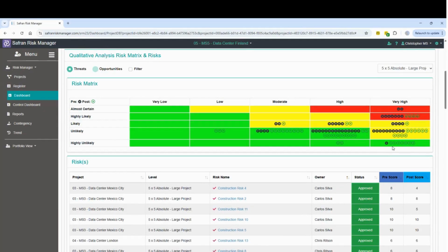These types of risks are the ones which invariably hide at the bottom of a probability impact diagram. And this is where my faith in probability impact diagrams is limited. The truth is, if I've got something which in a traditional risk register says is greater than $10 million, well, what's greater than $10 million to sit in this high impact? Well, $11 million is greater than $10 million, but so is $100 million. There's no way to differentiate between those two types of impact when we're looking at the standard probability impact diagram.